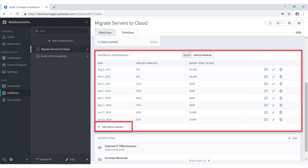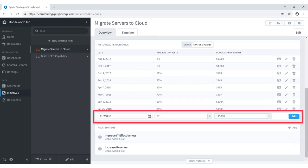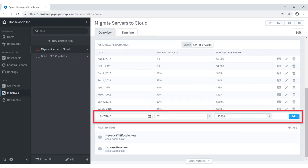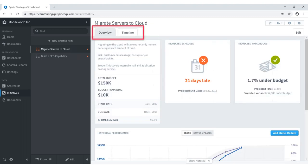You can toggle between a graphical overview and a status updates view — a tabular view showing the dates when updates were provided, the percent complete at that time, and budget spent to date. In the lower left corner is an Add Status Update button, where you can provide the date, percent complete, and budget spent. Each row also allows you to provide notes, edit values, or delete entries.